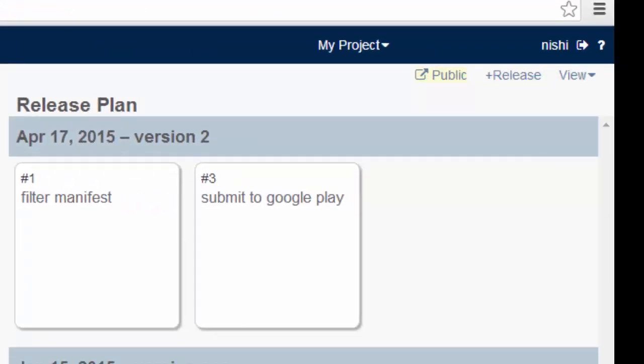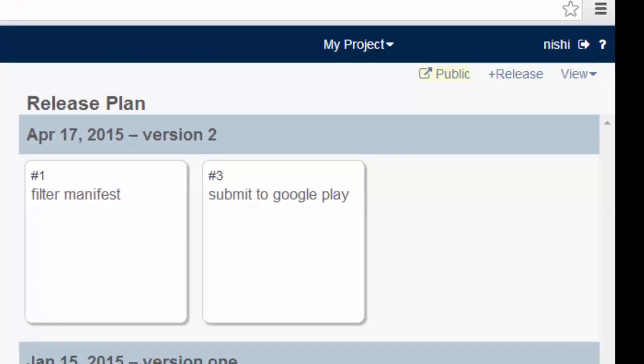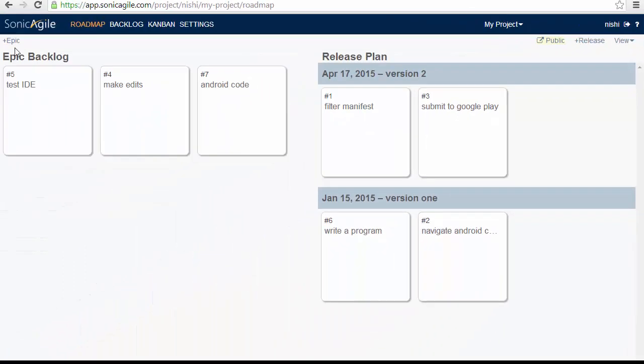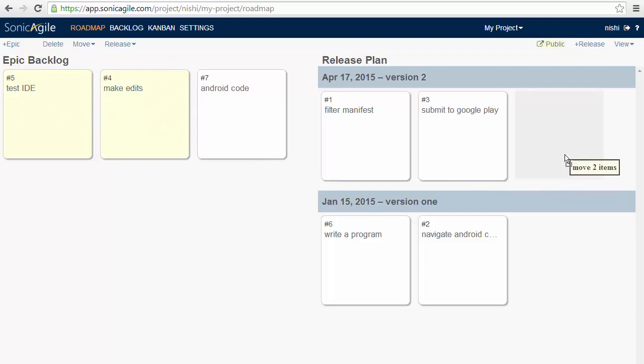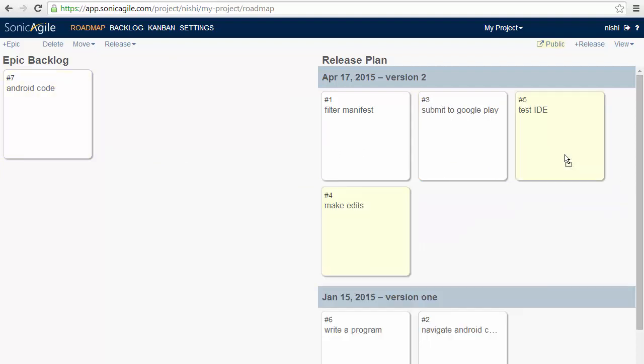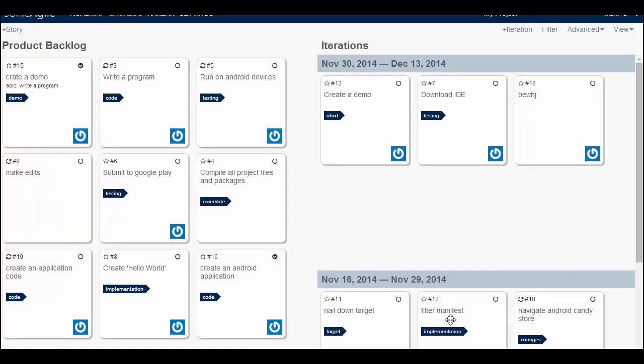The same thing as you have added story in your product backlog, you can add epics and here is the release plans for it. For example, I have created a version 1 release and a version 2 release. I can drag epics into the releases to plan the work that I want to perform with each release. For example, if I drag two of my epics into this release plan then I can do it like this.